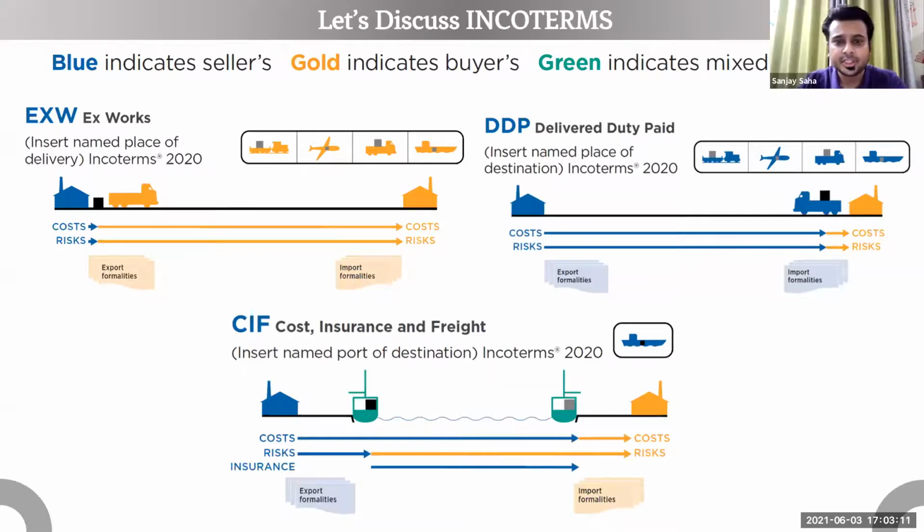Maybe if someone is thinking about a comment, let me also put a few things in context on why we are talking about Incoterms in a procurement lesson. Some of you might think, why are we talking Incoterms here? We should be talking about it under transportation, for example. The reason we are talking about it in procurement is that the prices that you receive from your suppliers are dependent on the Incoterms that you will specify in your tender documents.